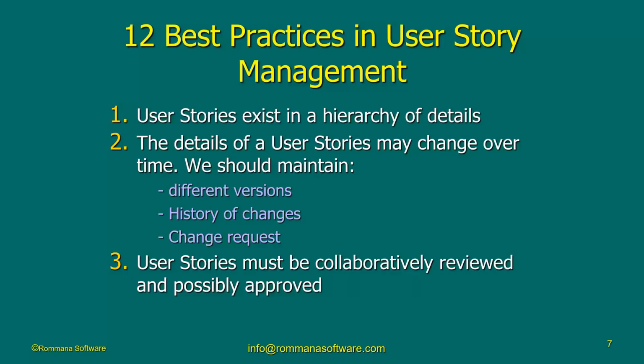So the concept of change request is completely independent of requirements or user stories. It's simply saying someone is requesting a change. Now, we take that change, we analyze it, we study it, we do the feasibility study of it. We say, okay, is that change possible? Can we make that change in the current release or in the current sprint? And if so, would that change require making a change to an existing user story, or do we need to write a totally different user story? Or do we need to postpone that change request to the next sprint or the next release? So I don't see the concept of a change request in Agile projects.